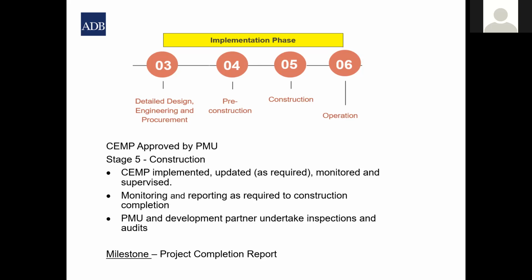That can be approved, and then you can say, well, you can go ahead and do your site clearance and your initial activities, but before you start your next construction activity, you've got to give us that site-specific plan for approval before that started. We're not trying to stop him doing his work. We don't want to limit him from getting on with the job, and by getting everything up front done. But what we do want is that for whatever work he's starting with, that specific piece of work needs to be approved from a construction environmental management plan.